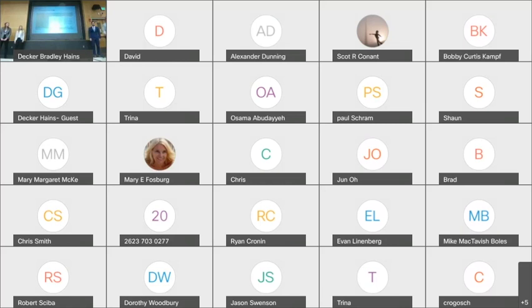And moving on to the estimation portion of our project, beginning with the transportation costs. The transportation estimate covers the cost to construct both the roadway and the sidewalks for both sides. So see the column all the way on your left. Both the public and private layout use the same cost codes to determine their estimate. Slightly different quantities, and both estimations come out to a total of about $840,000.